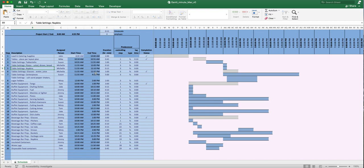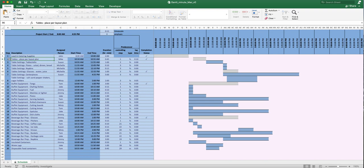A Gantt chart is a project management tool that helps you keep track of interrelated tasks — like the foundation and framing example. The way you tell this tool which tasks depend on which other tasks is through three columns: predecessor, controlling step type, and lag time. For example, step two — placing tables per the layout plan — has controlling step one, meaning step one must be completed before step two can begin.